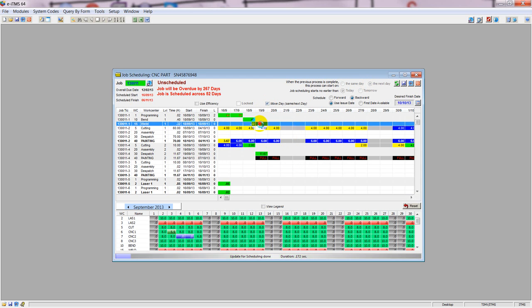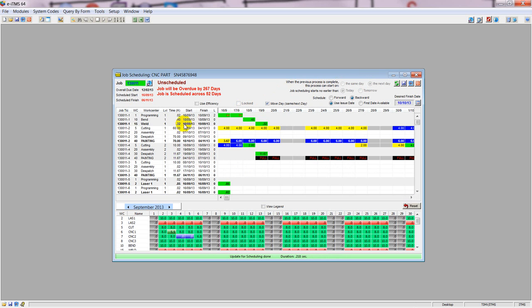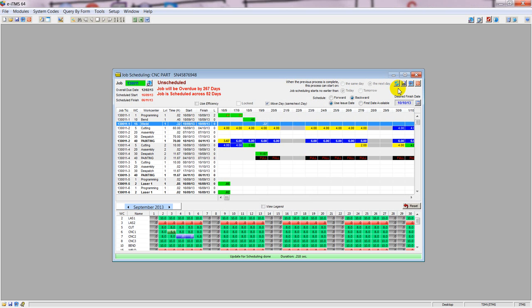However, you can also move the thing around, so you can say, well, if it does default to that method, all down there, then you can click on there and it'll move it to the next day. Other than that, if you want to change this date here, you need to double click in there and say, I want that specific process to start on this specific day, and reschedule, and it moves that specific process out to there.